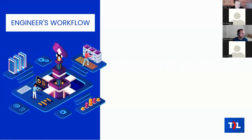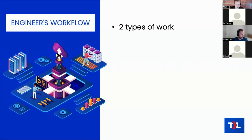Let's talk about the engineer's workflow. We've covered the beginning parts thoroughly over multiple weeks, but we haven't said much about how engineers actually work. There are two main types of work: scheduled work and queued work. Scheduled work is only in the calendar because of the nature of the work or the customer's needs — we're not putting everything in the calendar just as a way to manage work.